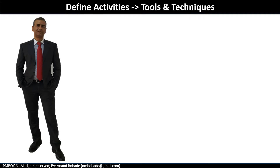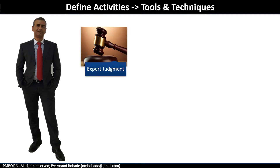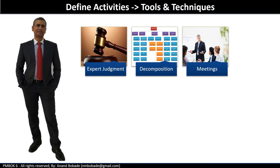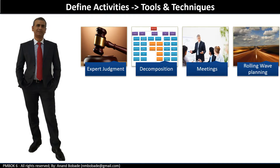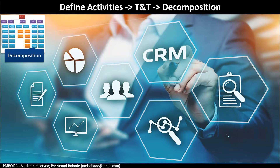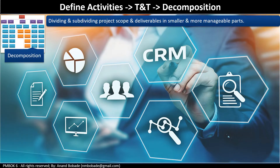The tools and techniques are: expert judgment — individuals or groups who have worked on similar past projects would be helpful in identifying activities needed to produce each work package. Then you have decomposition, meeting, and rolling wave planning. Decomposition is the same technique used in the create work breakdown structure process. This technique takes the scope in the form of deliverables and divides it into smaller, more manageable parts called work packages.